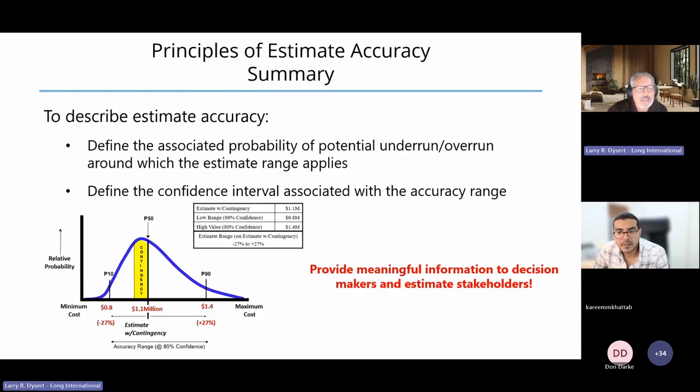Well, that's what management thinks is the scope of the project, and that's the beginning scope. Back at class 5, that's how we created our class 5 estimate. It was probably just plugging 80,000 barrels per day into a quick capacity factored estimating tool, and it generated a cost per barrel that then totaled up to the overall cost.